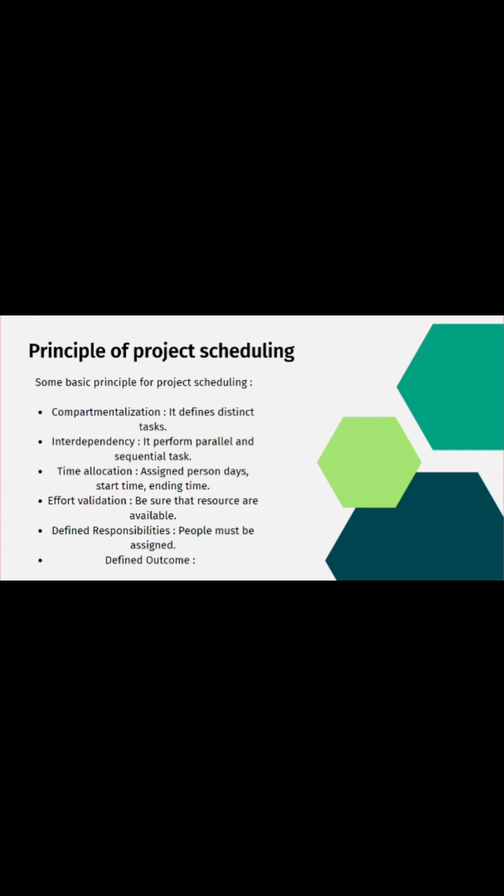Next is effort validation. Be sure that resources are available. It means the project manager must ensure that on any given day there are enough staff members assigned to complete the task within the time estimate in the project plan.